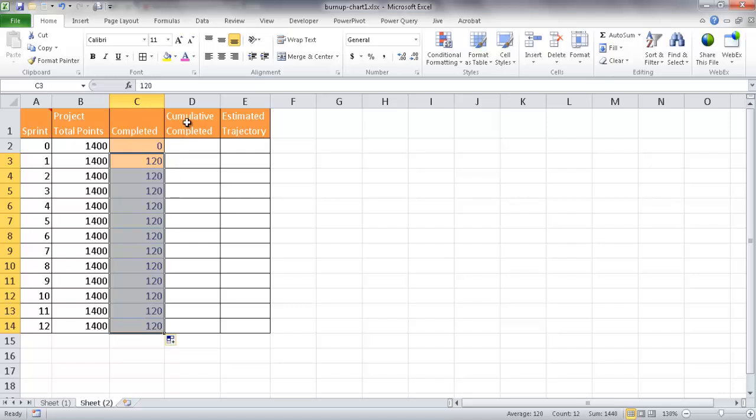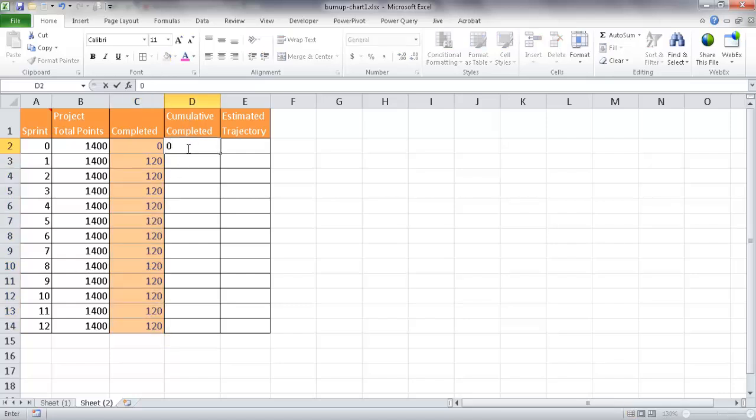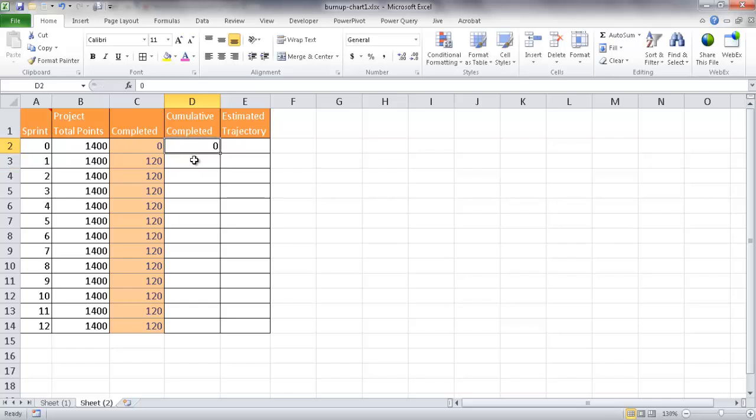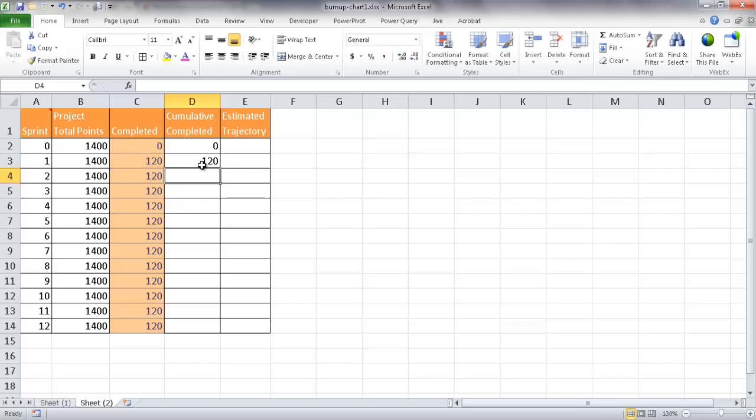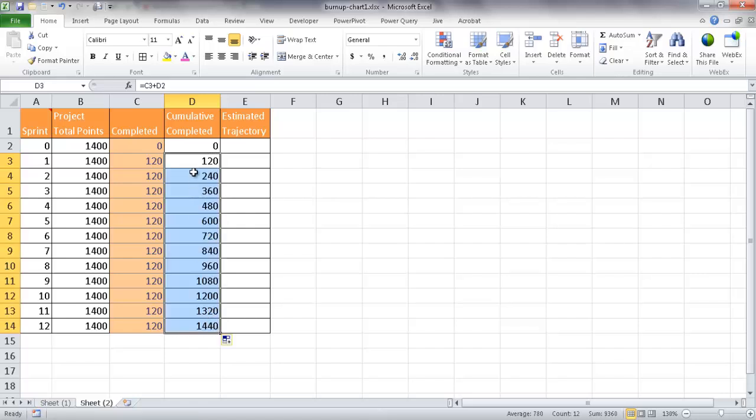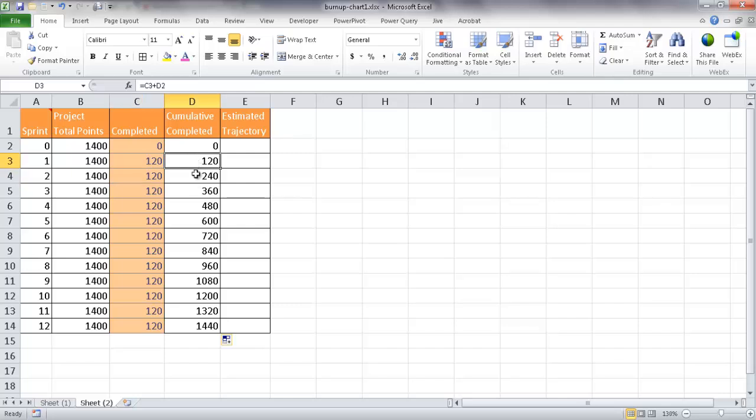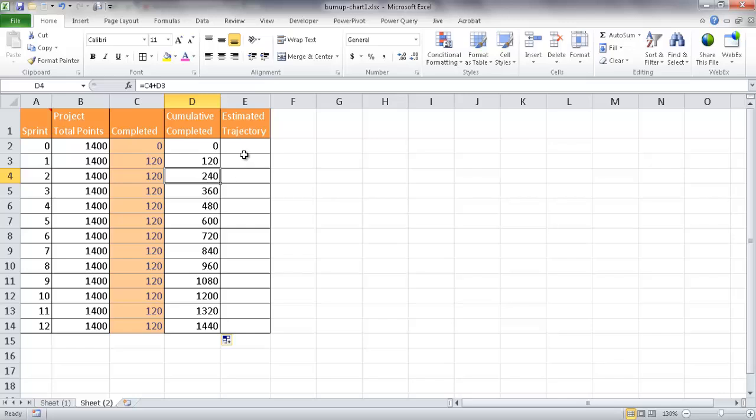And the cumulative completed basically is the cumulative after each sprint cycle. So this is going to be the first one where we start at zero. It's going to be zero. The second one, what basically we're going to do is we're going to add the first month plus the previous. And then what that's going to do is now I can just go ahead and take this fill handle and drag it down. It's going to copy the formula. And basically it's going to add the first month to what was before. And this one will add that other month to what was before and et cetera.